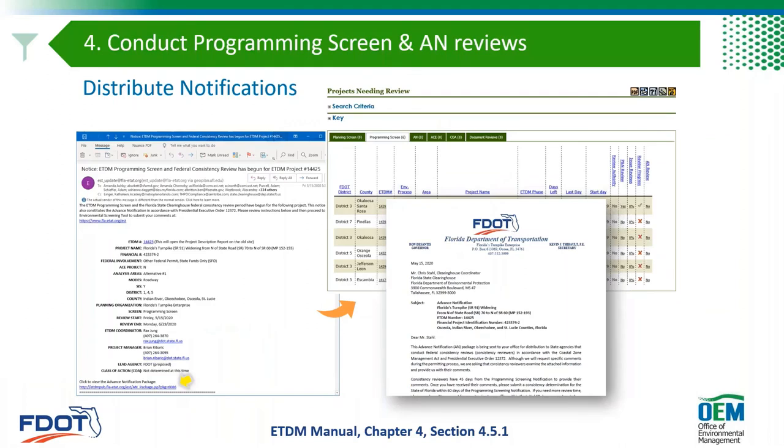So after you've prepared the information and done some initial coordination with them, you will send out the notification through the EST. And there's a tool in there to help you build it. This email goes out to all of the ETAT that are assigned by geographic district. So they're assigned to a geographic area. Some ETAT are statewide, others are more specific, but the EST has them coded as the agency has told us.